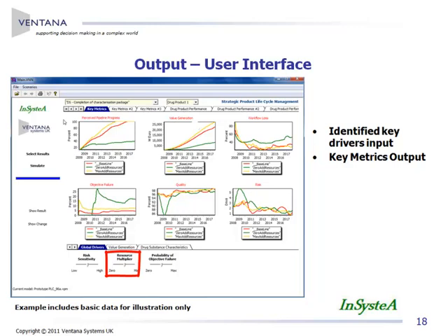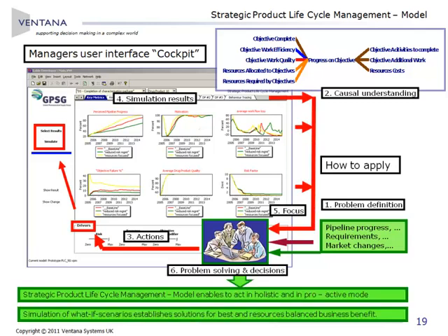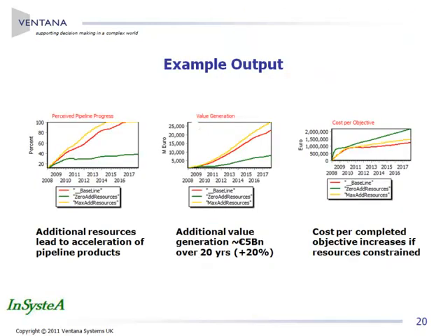And so that's just a simple slider bar to show what the impact would be if you don't allocate anything above the normal number of technicians, or if you allocate up to the maximum number of technicians. So it's an overall policy thing, just to see what effect it might have. And so those simulation runs have been done just to show what impact that might have on the value generation. The green is a situation where they were unable to respond to falling behind schedule, and the yellow was they were able to apply additional resources.